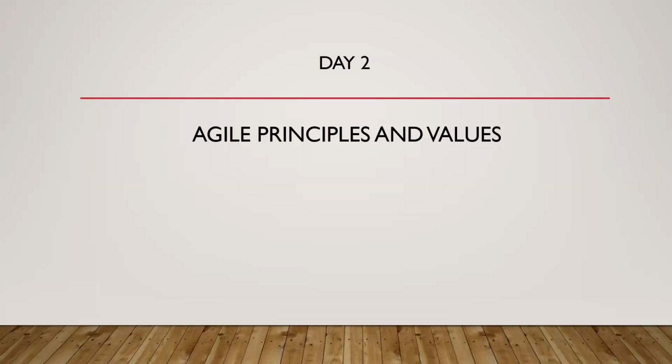They need to sit together, analyze that particular thing, and come to a conclusion saying it will take 1 day or 2 days, in terms of hours, days, or user story points. That will come again. So the Scrum Master's role is just helping them understand how to estimate how much time a particular user story is going to take.